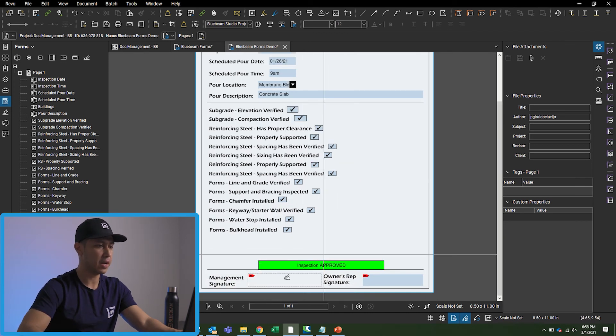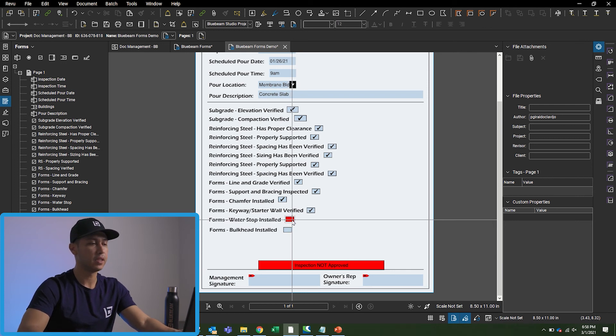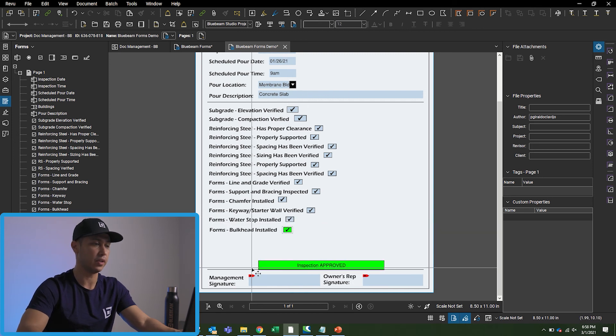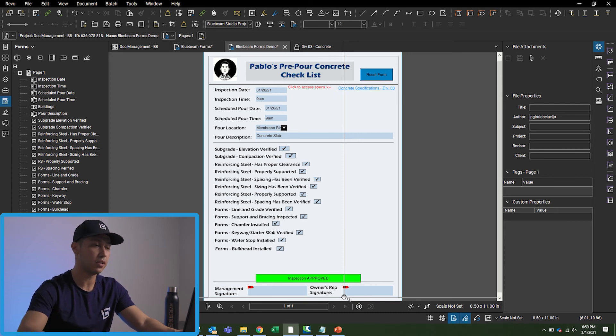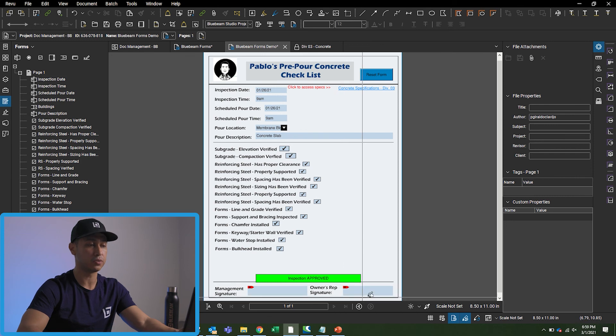Once I finish checking all the boxes, this indicator turns green. If I haven't finished checking the boxes, it stays red. When out in the field going through the concrete pre-pour checklist and everything is confirmed good, the project superintendent can sign at the bottom with an iPad, and the owner's rep can sign there as well. That's pretty much it — I wanted to make a quick video on forms. Hopefully you found this useful. Follow me on social media, support my YouTube page, thanks for watching, and I'll see you on the next one.